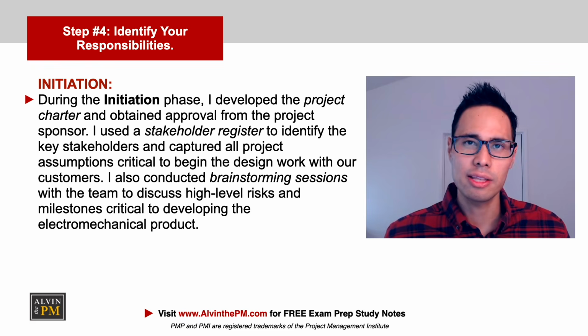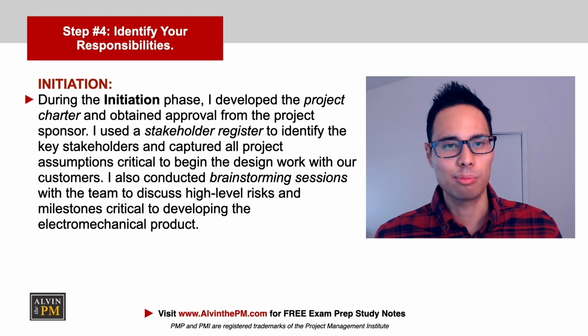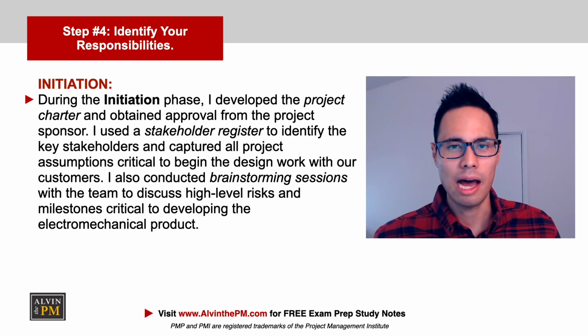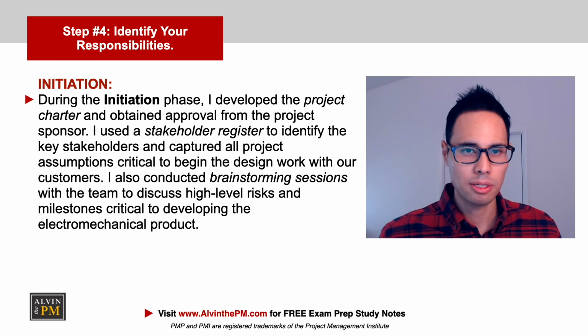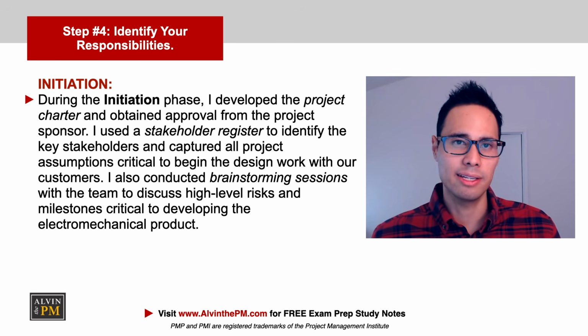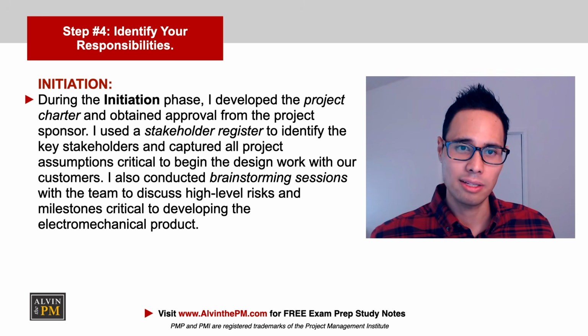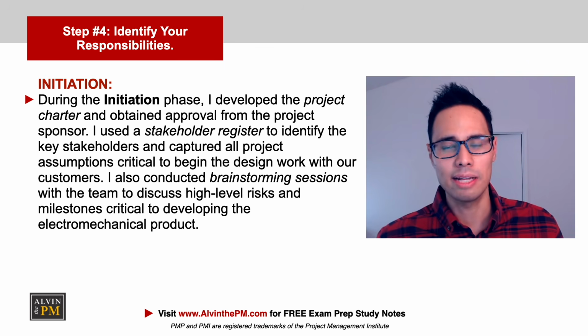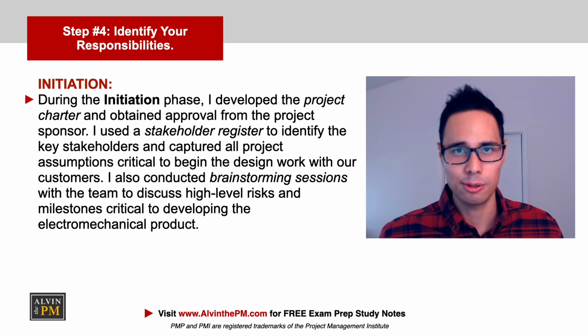The first one is through initiation. During the initiation phase, I developed the project charter and obtained approval from the project sponsor. I used a stakeholder register to identify the key stakeholders, and I captured all project assumptions critical to begin the design work with our customers. I also conducted brainstorming sessions with the team to discuss high-level risks and milestones critical to developing the electromechanical product.